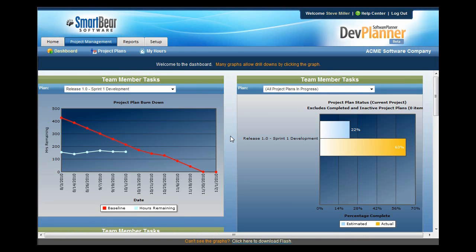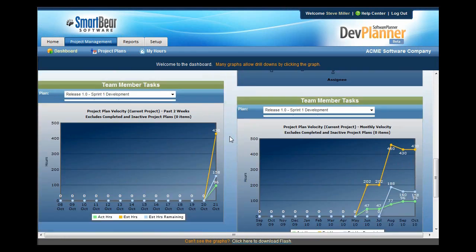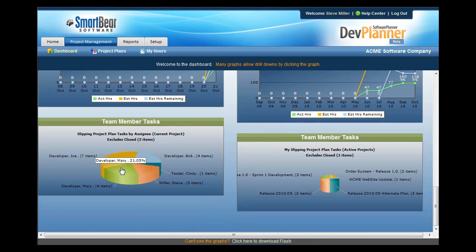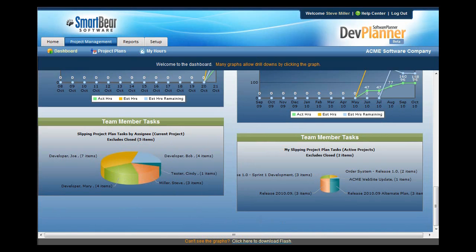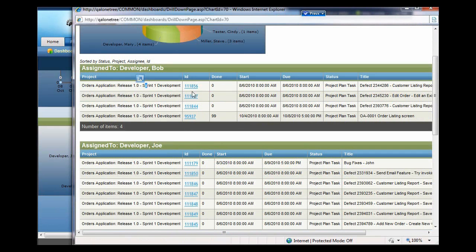Use Dev Planner's rich dashboards to produce burndown charts, resource availability reports, planned velocity, as well as slipping tasks. The Slipping Tasks report will show you each person that has tasks that should be 100% done by today, but for whatever reason they're not. If you click on the graph, it'll show you the details. The detail report identifies each engineer that you've assigned tasks to, and it shows specifically what they've been allocated towards and what their percentage complete is.